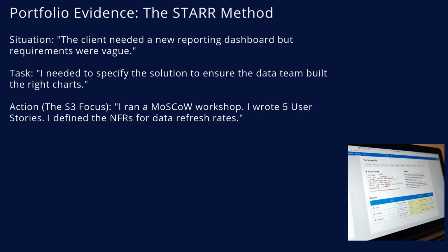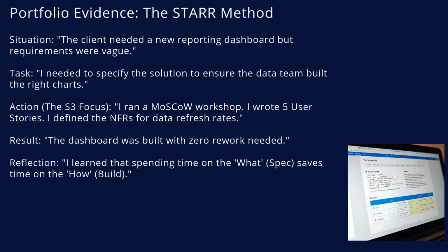I facilitated a workshop to gather requirements. I used the Moscow method to prioritize features. I wrote 5 detailed user stories and defined the non-functional requirement regarding data refresh rates. Result: the dashboard was delivered on time with zero rework needed. Reflection: I learned that investing time in the specification saves massive amounts of time during the build.